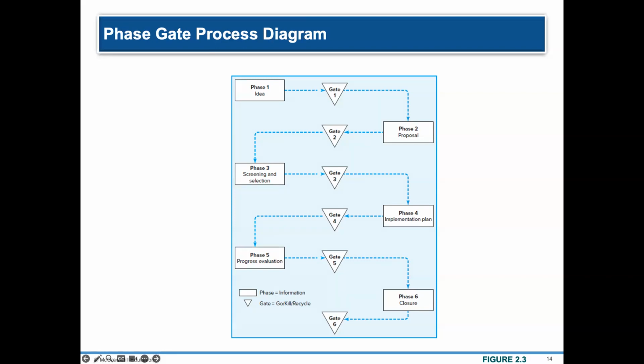If the project proposal does not at all meet the overall strategic plan of the company, then it could potentially be canceled altogether. If the proposal is okay, but there are some areas in which there needs to be improvements, therefore, the proponent of the proposal would have to resubmit the proposal.